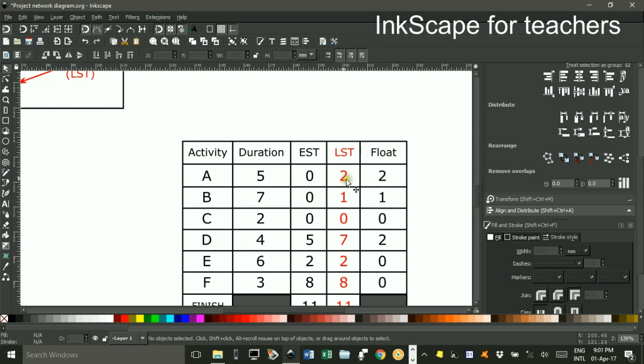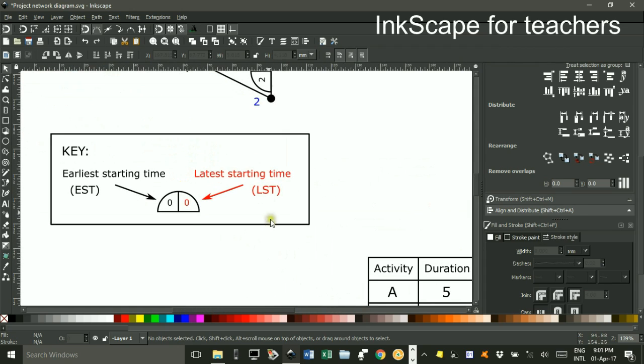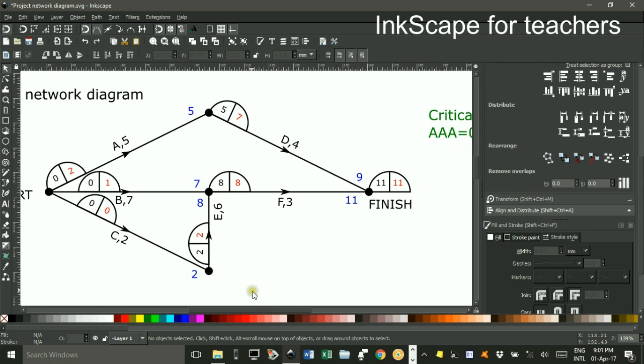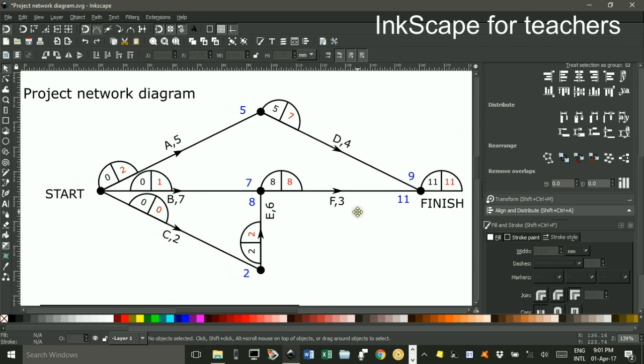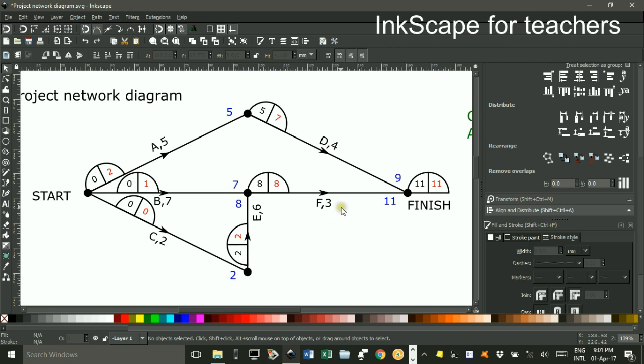The float time is the difference between the latest starting time and the earliest starting time. 7 take 5 is 2 here. So for example, activity D could be delayed by 2 hours without delaying the whole project. You can see that up here. Because at the moment D finishes after 9 hours, so it could delay another 2 hours, and we still haven't gone past that 11 hours that we had to wait coming this method.